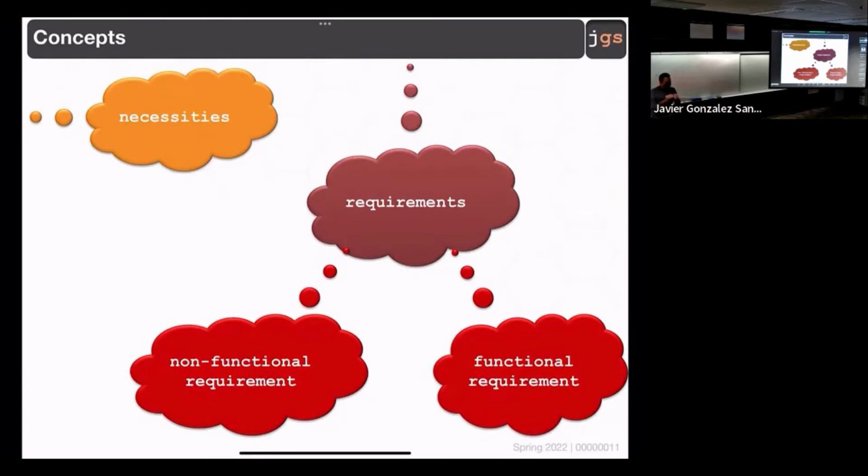Second, after you review the INVEST, the next thing to do is ask, well, is the requirement going to be functional or not? The main reason I am asking you to identify one or the other, I mentioned this before. Functional requirements are going to be the work of one person in your team. Someone is going to develop that functionality. Non-functional requirements are going to be the responsibility of the full team in a very particular way that we need to review. This is all about the estimation of the project.